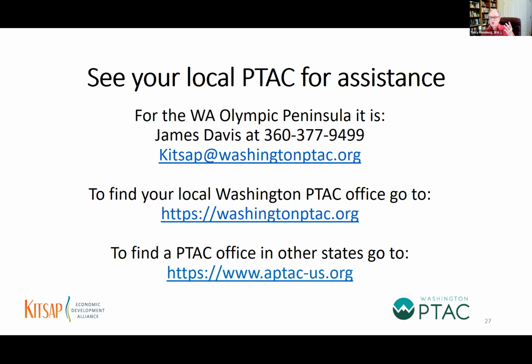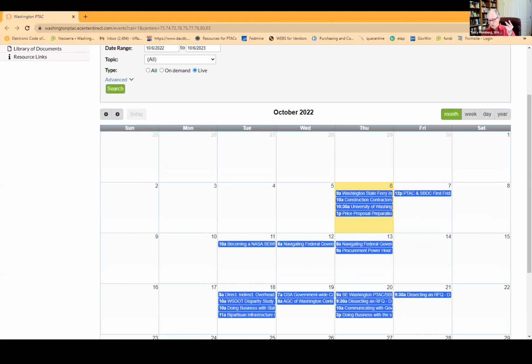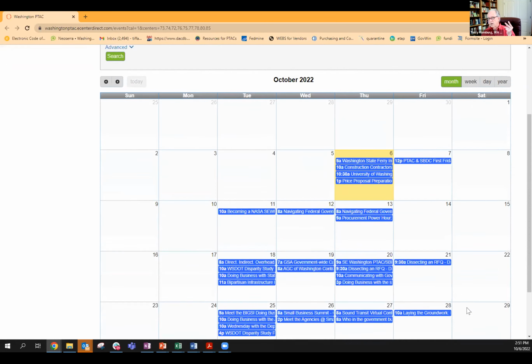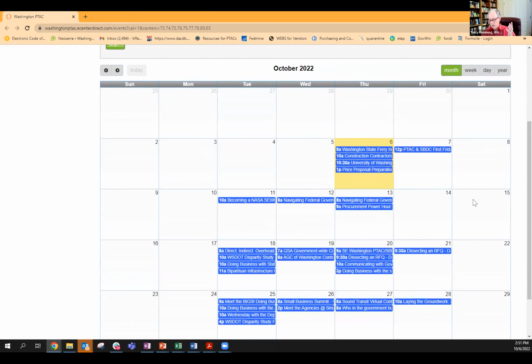So in a large procurement, which I said was over $250,000, there's typically 3 components of a proposal. There's the cover letter, the price proposal, and the technical proposal. So today we covered the price proposal. The technical proposal, I said, putting together a winning technical proposal was, I think, January 25th. So that's quite some ways off.